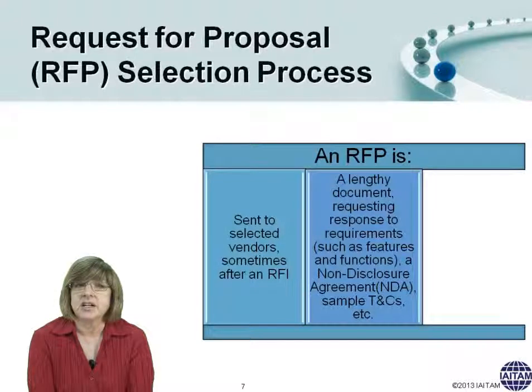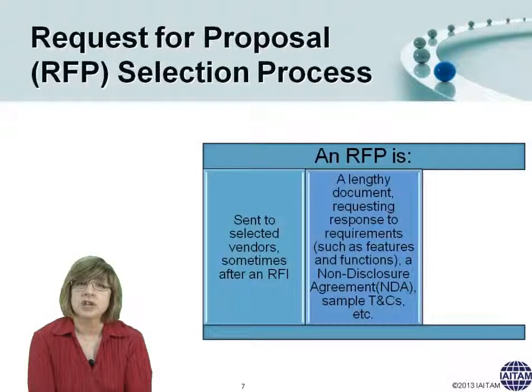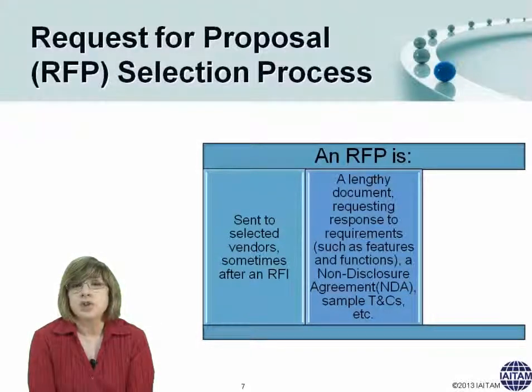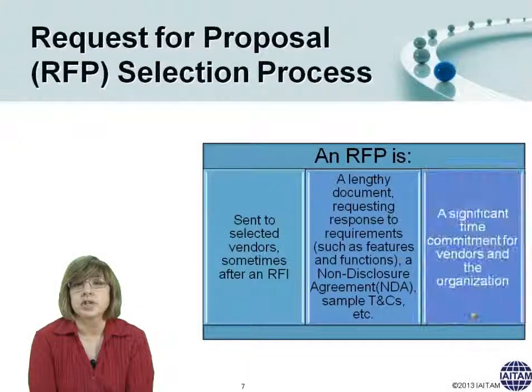It can be a lengthy document. It could include things such as product and service components. So therefore, you will need to have documents such as a non-disclosure created to make sure that if you have to discuss and educate the vendor on what the needs are for the organization, you will have no problems in doing that because they have agreed not to disclose proprietary or company confidential information. So also you would have some sample terms and conditions in there that the vendor would have to agree to in order to do business with your organization.